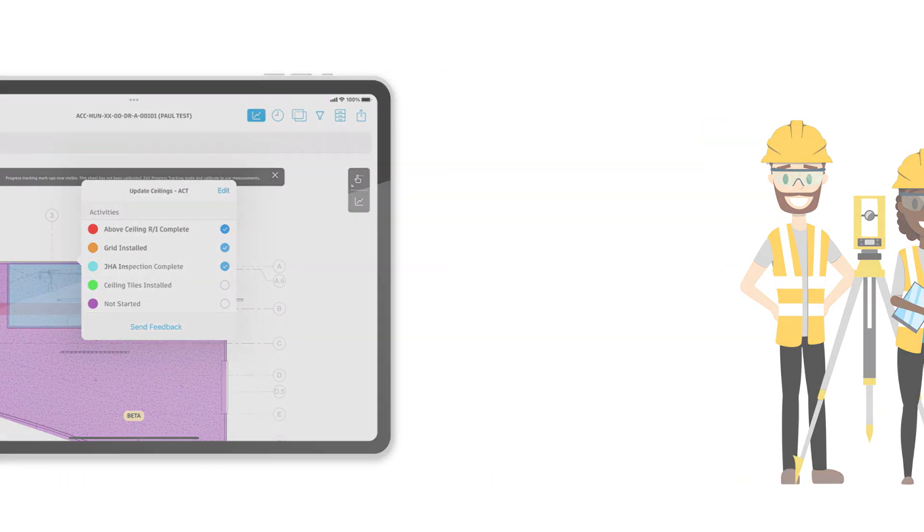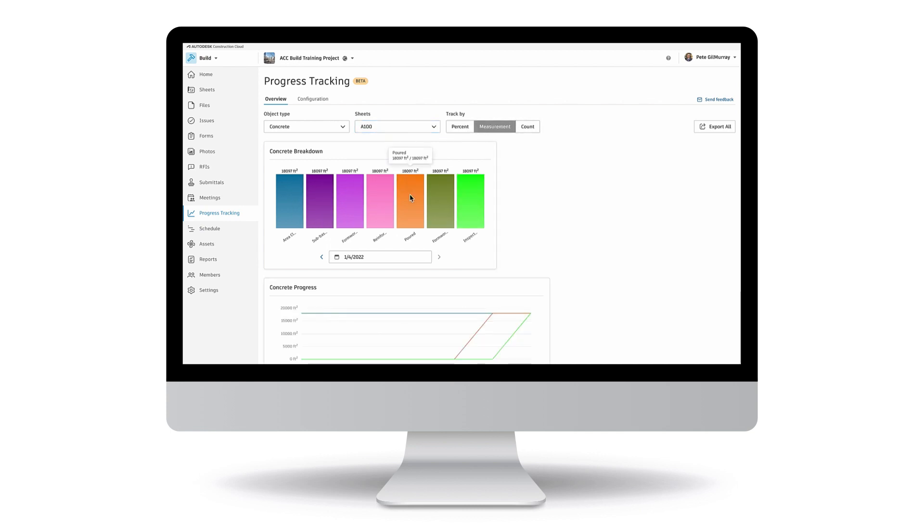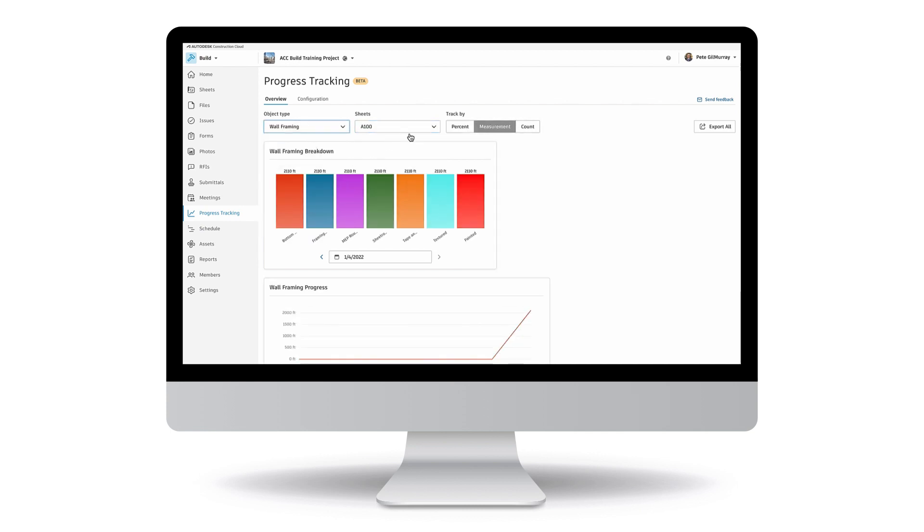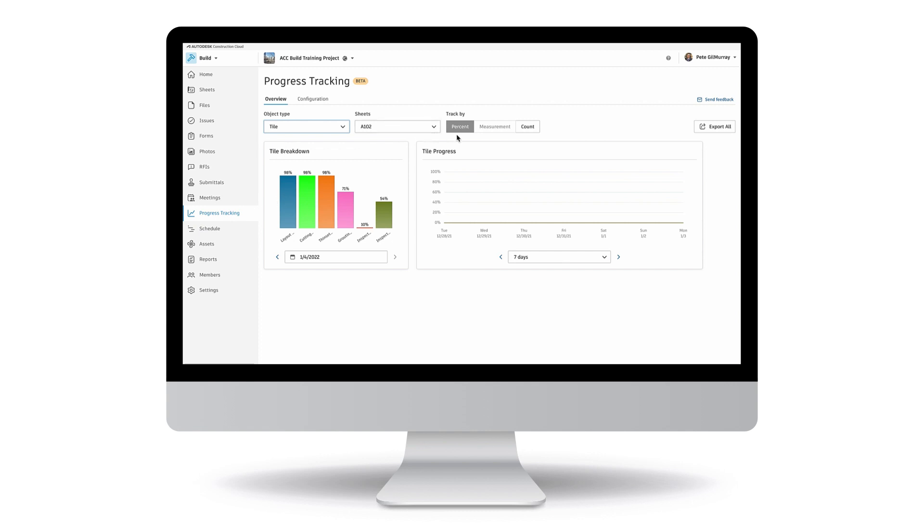For example, we can track how much concrete has been poured on the lower level, what percent of framing is up on the third floor, whether MEP has been roughed in, how much tile has been installed, and so on.